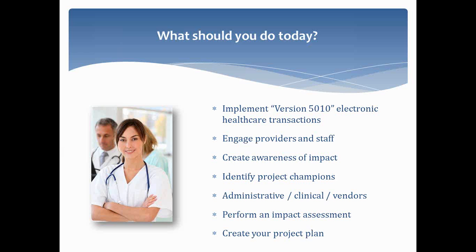But making sure that you're picking the people that are dedicated, enthusiastic, understand the importance of the ICD-10 change, and who also represent the different key areas within the practice that are going to be able to come together as a team and plan for all of the different impacts. So having somebody from the administrative side, billing, coding, front desk, having somebody from the clinical side. So do you have a physician and a nurse practitioner, or is it just a physician?